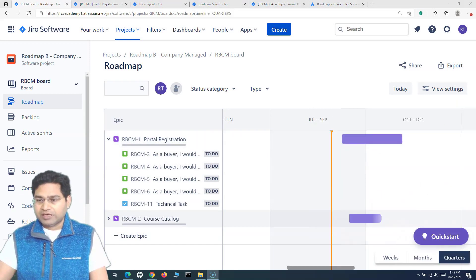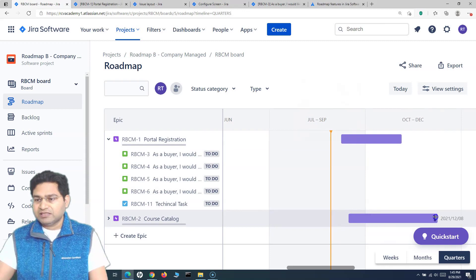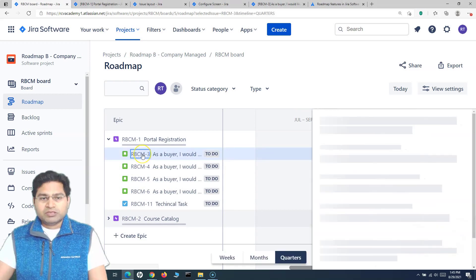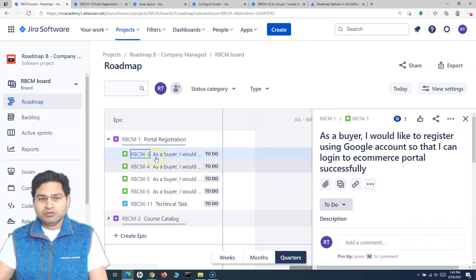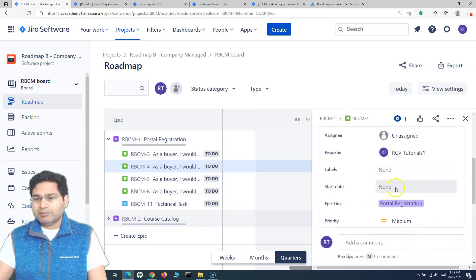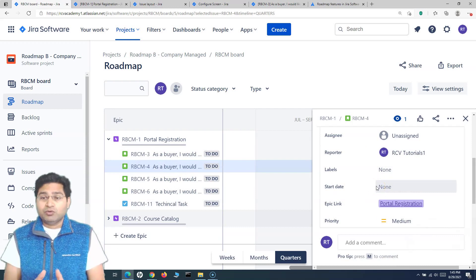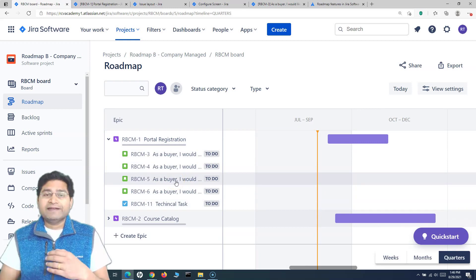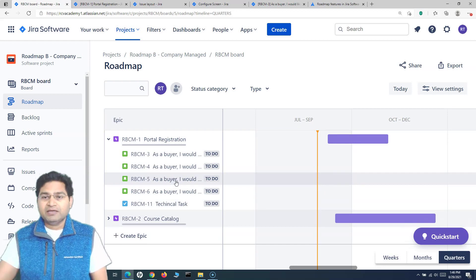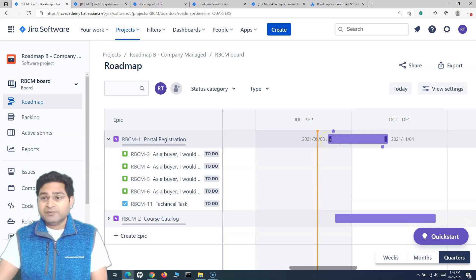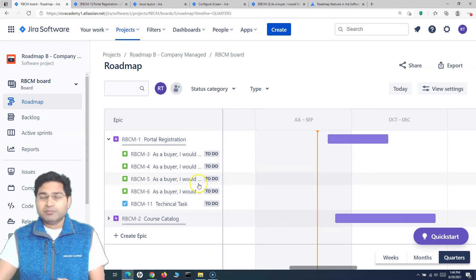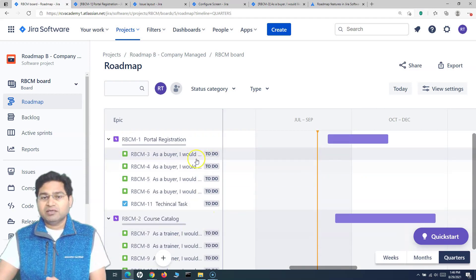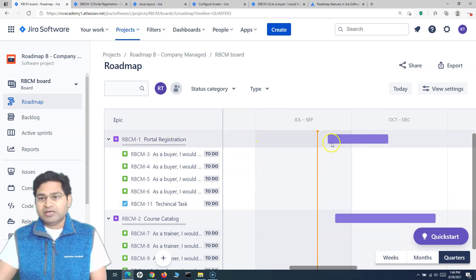To update the end date, simply drag and drop the timeline bar on the roadmap and the details update accordingly. For individual user stories, click the story and update the start date as per your plan. It's very important to update the start and end dates for all work items within each epic, to ensure the work item dates align with the start and end dates of the parent epic.